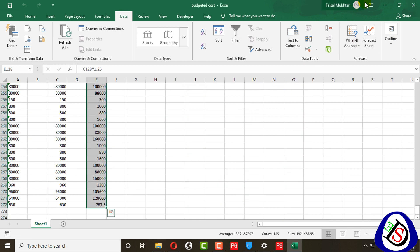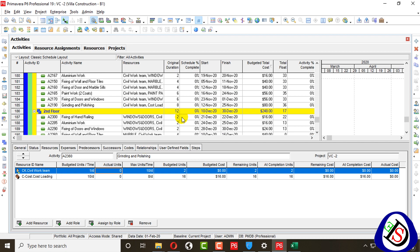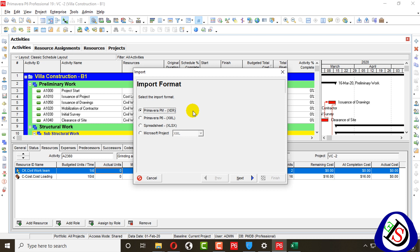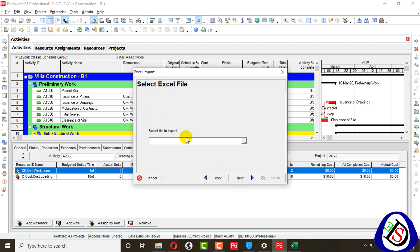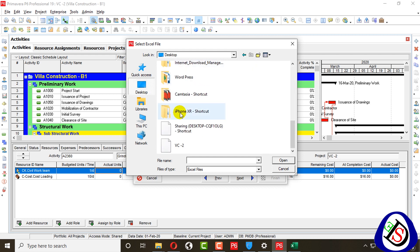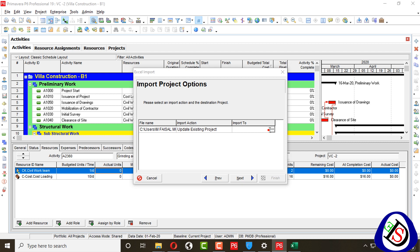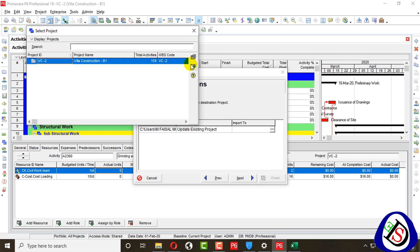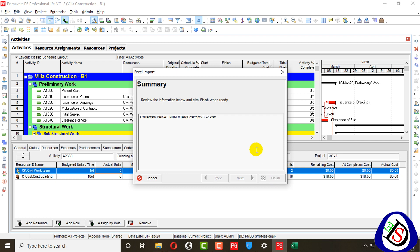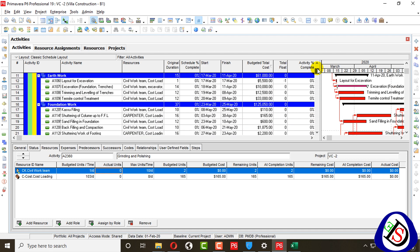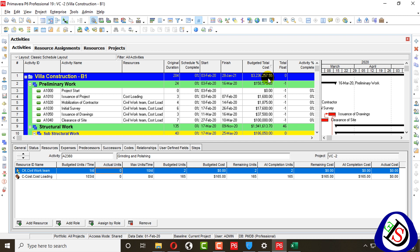Now I will import this updated Excel file back into Primavera P6. I go to File > Import, select XLS file, browse to the desktop file VC2, click Next. I select Activities and Resource Assignments, choose Update Existing Project, then import to this project with 159 activities. After clicking Finish and closing, you can see the cost is now loaded — 3.236 million dollars.